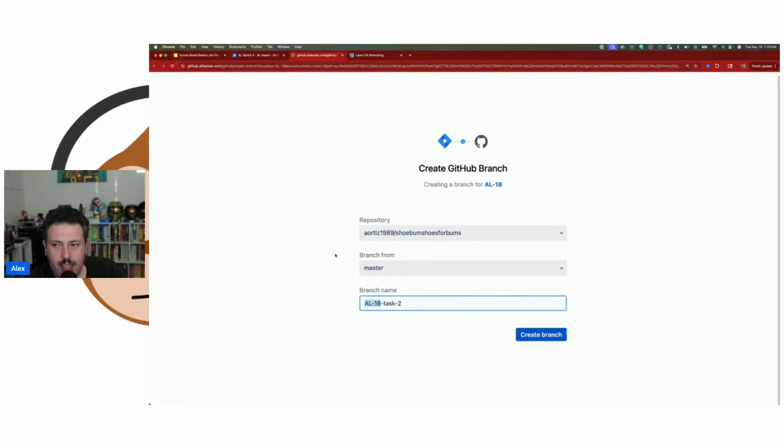If you're multitasking, stop what you're doing, pay attention, because if you screw this step up, the whole thing has been in vain. You must, or at least your developers must, put the key in the branch or the commit to get this integration to happen and to get the handshake to happen. If you skip this, then there's no point in doing any of this because it will not know to talk to each other. You or your developer, 99% of the time your developer, must put the key inside the branch name so we can get cooking with some fire here, okay?